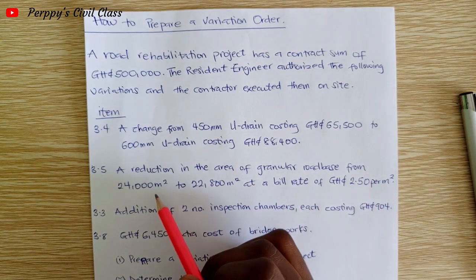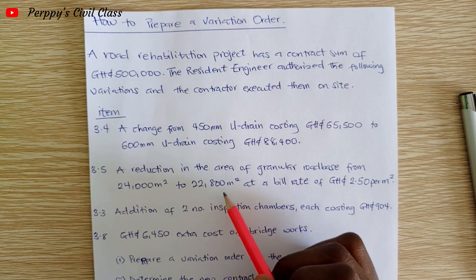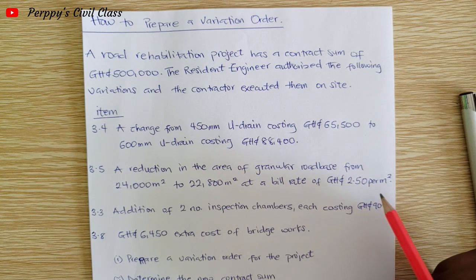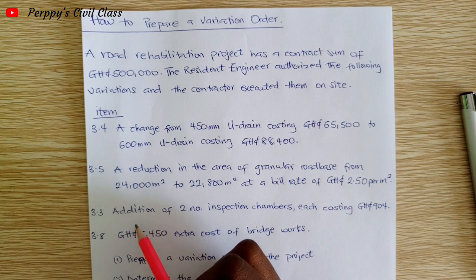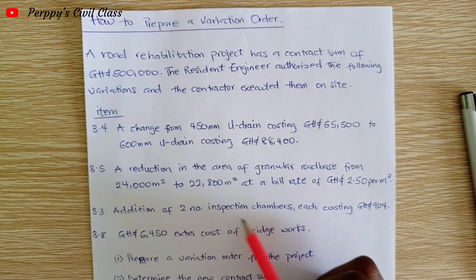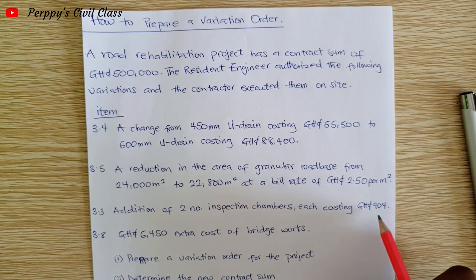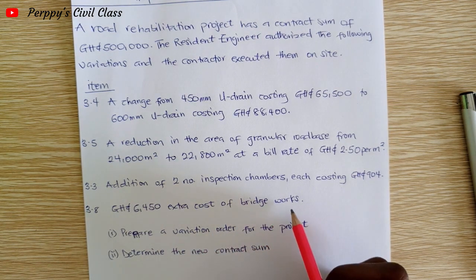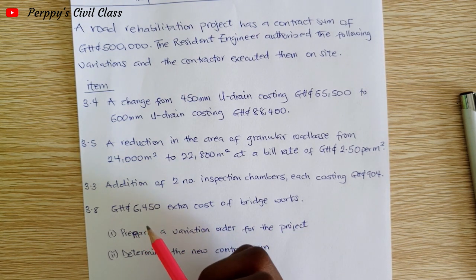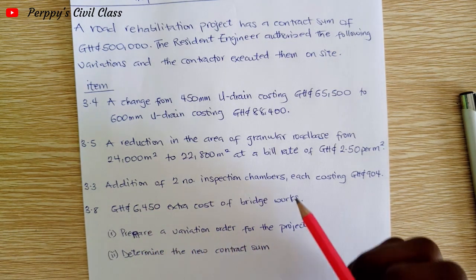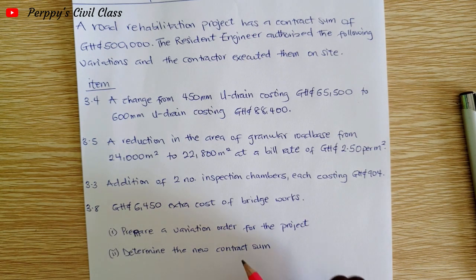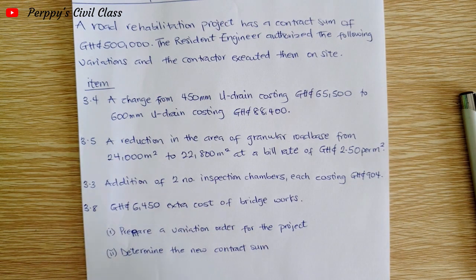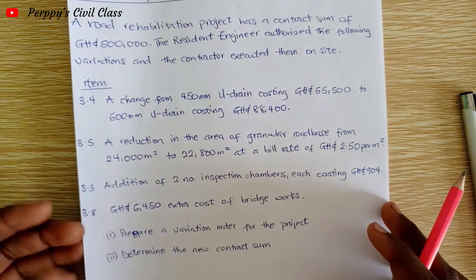Item 3.5: a reduction in the area of a granular road base from 24,000 square meters to 22,800 square meters at a bill rate of 2.50 per square meter. Item 3.3: addition of two number inspection chambers each costing 904 Ghana cedis. Item 3.8: extra cost of bridge works costing 6,450 Ghana cedis. We have to prepare a variation order and determine the new contract sum.